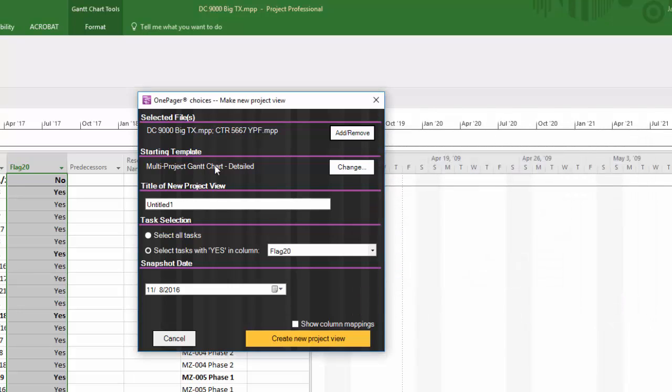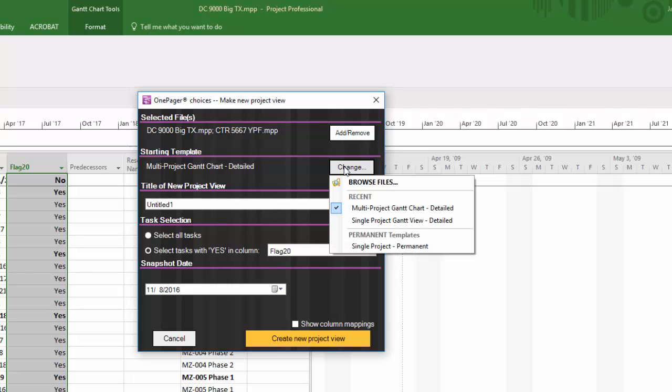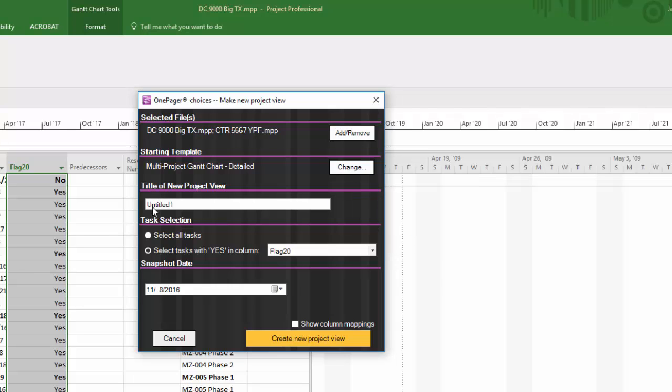The first time you try this, you must make sure to choose a multi-project template from your available templates, which has a particular setting that allows OnePager to uniquely recognize data as coming from the separate files. Multi Project Gantt View Detail is a good one to start with.